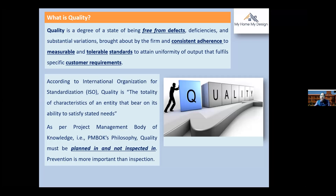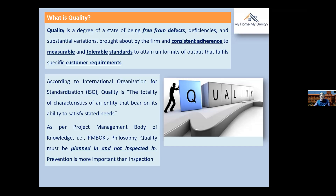As per the Project Management Body of Knowledge (PMBOK), quality must be planned in and not inspected in — prevention is more important than inspection. When we go for inspection, quality has to already be in place. This is what we call quality assurance. Whatever assurance we give to the customer has to be documented in proper language with proper records. When the same thing is implemented on the ground, it is called quality control.